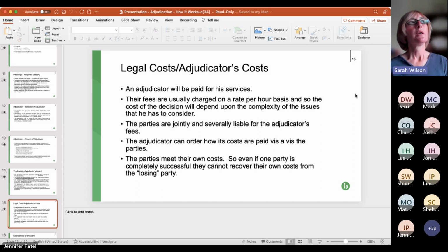So I mentioned that in the referral, the referring party might want, in the redress or the remedy sought, to claim their costs. There's a strict procedure to be followed to include that, which means that you can only ask the adjudicator to determine that one or the other party pays the other's legal costs. So the loser, effectively, pays the winner's legal costs.